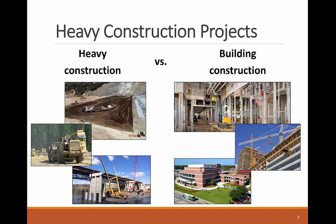Third, as you can see from the photos, heavy projects have fewer trades and specialty work packages compared to building projects. Looking at the interior building photo during construction, you can see electrical, plumbing, mechanical, fire sprinkler, concrete, drywall studs, and other systems. On the other hand, heavy construction projects have a lot of dirt and soil to move, and large structures made of steel and concrete. There are a few cases of heavy projects that include mechanical, electrical, and plumbing systems, such as water and energy plants.